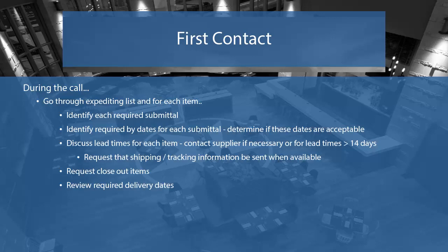If an item will be delivered in phases, each phase will be tracked under a separate expediting item with its own delivery date. Structural steel is a good example, as it will likely involve phases, such as starting in the northeast corner of the building between grids 1 and 3, then duplicating the items for each phase in other areas. All drawings will be attached to the first expediting item, and subsequent items will be marked "No approval required."